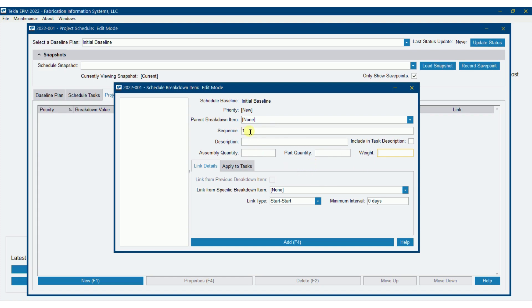One important thing to note: if you want to pull data over from production controls — such as the number of pieces and their weight — the sequence number here must match the sequence number in production control exactly. For example, I can't use 'SEQ 1' and expect it to match up with just the number '1' in production control. It has to be identical, so make sure that's the case.